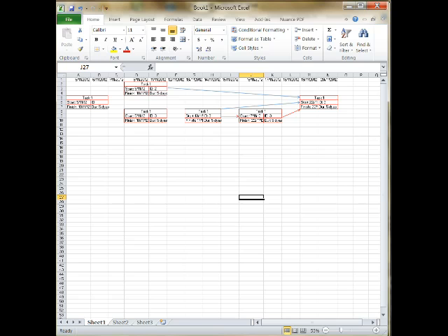Task 4 and task 5 both start after task 2 has been completed. That means they would start on the same date. That's why we have predecessors in the work breakdown structure. It's telling you this task cannot start until the previous task has completed. Is that helpful, Chris?